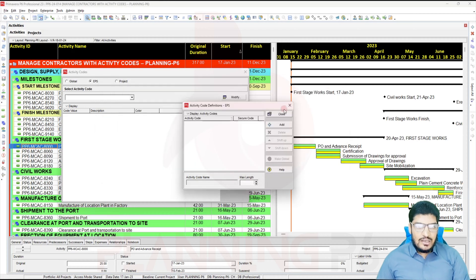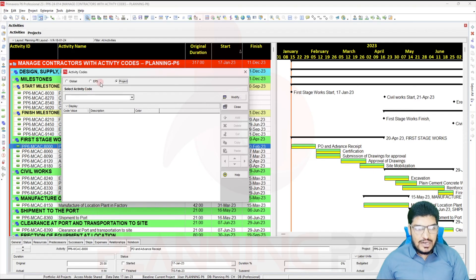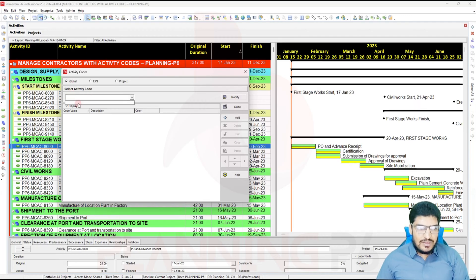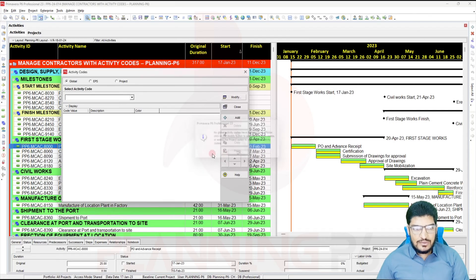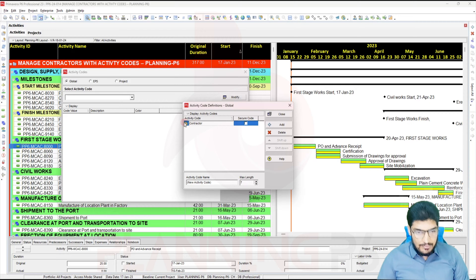For EPS and the project, you are able to do it only for that project. If you are preparing for this project, that's fine, but for all projects you can move it to global after preparation — you have the option to move it to global to use in any other project. I don't have any activity code yet, so I will create one. I will click Add and modify. Here in the activity code name I will write 'Contractors' because I am preparing for that.